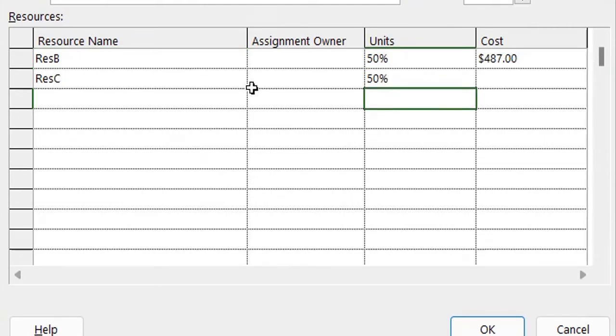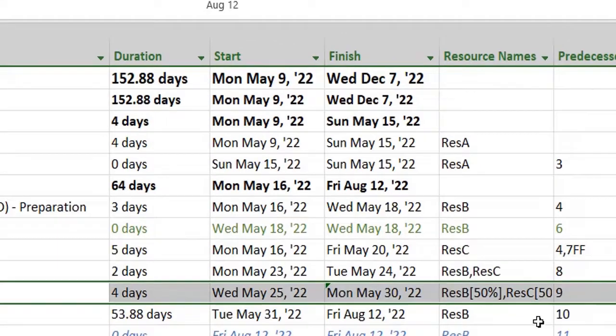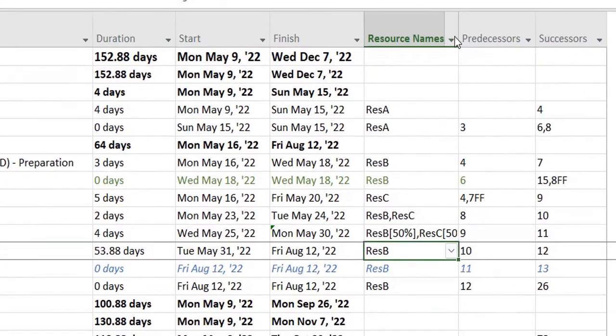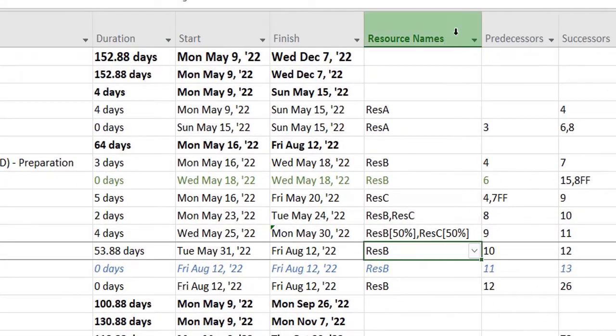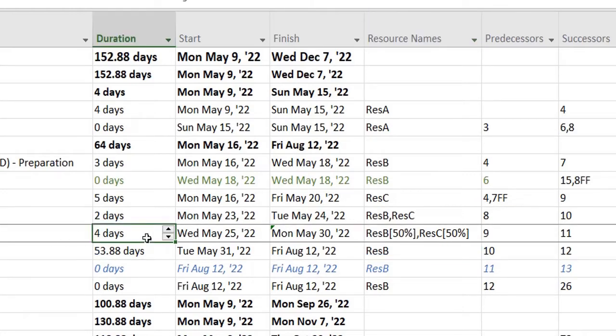I will select OK, and over here you can see that it starts showing the resources based on their percentage. For example, out of four days, 50 percent of the days would be taken up by Resource B and 50 percent will be taken up by Resource C.